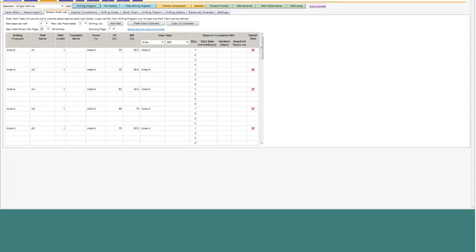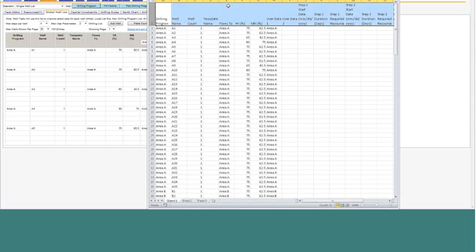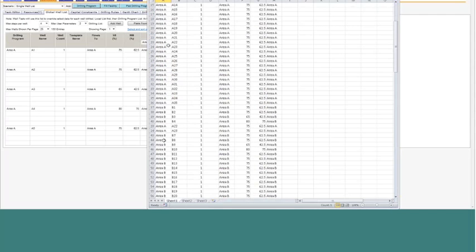So I'm copying this out and pasting this into Excel, and I'll bring this over here so you guys can see it. But what we've done is, in addition to it being a well list, you can now also specify this drilling program in this global well list. So I can specify which drilling program the wells apply to.